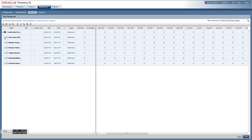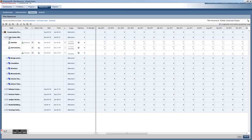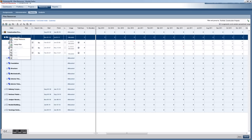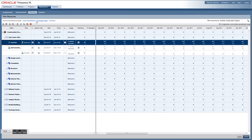In the planning resources module, you can take a top-down approach by selecting a project and assigning a resource at a high level as a percentage of their time across the life of the project. You can also export this view to a spreadsheet.